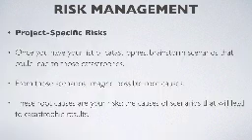Once you answer these questions, you will have a list of catastrophes. Brainstorm scenarios that could lead to these catastrophes. So you have identified what could go wrong. You now brainstorm with your teammates to see what could cause that catastrophe, or in other words, you identify the root causes for these failures. These root causes are called your risks: the causes of these scenarios that will lead to failures or catastrophic results.